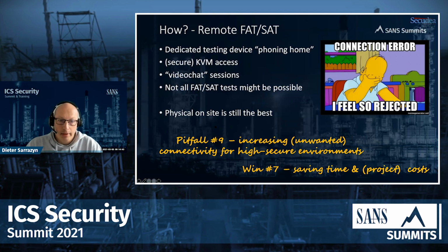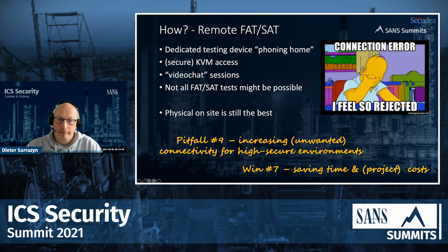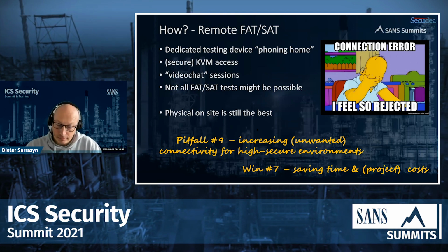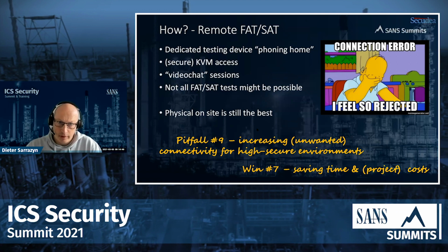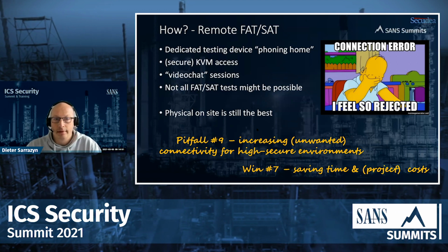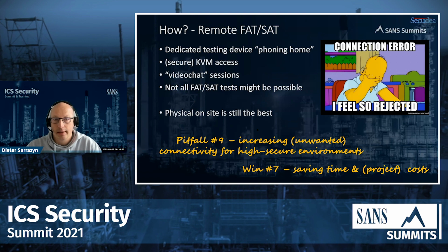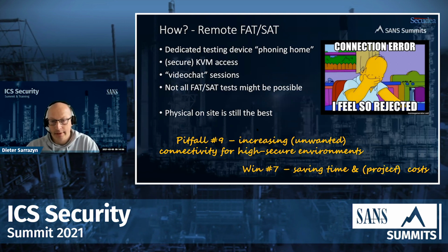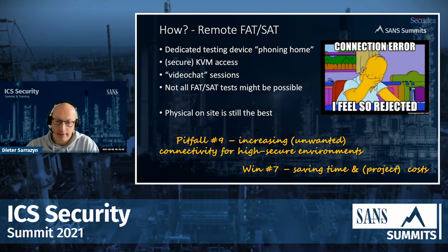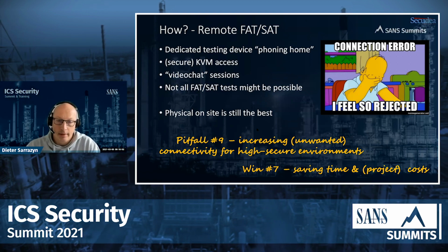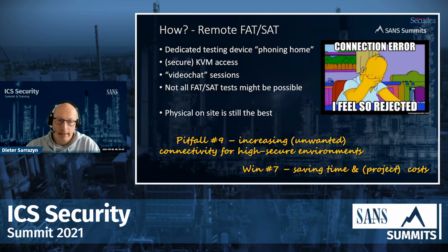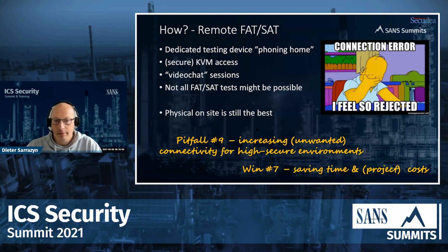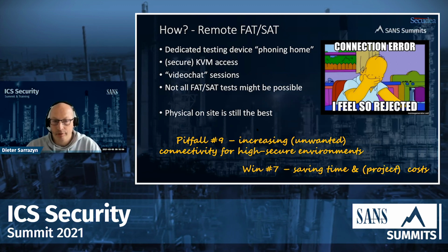So in my opinion, physical FATSAT testing is still the best. A way of working around that limitation is that you do FATSAT testing just before the SAT, when the systems are on site. The problem with that is that the vendor might not be able to make any changes anymore to the environment.